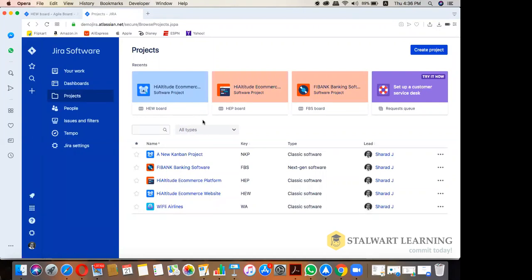You can have a workflow where you have blocked as one of the states. The other way is to configure your board to include one column which says blocked, but it is not part of your state. It is just a column called blocked, and you move that item into it so that it is highlighted. But again, Jira offers you this much. To clear that block, your Scrum Master comes in handy. Your Scrum Master is the person who should be clearing it out. But yes, you can use Jira to mark it. The best way to mark it is through a workflow.